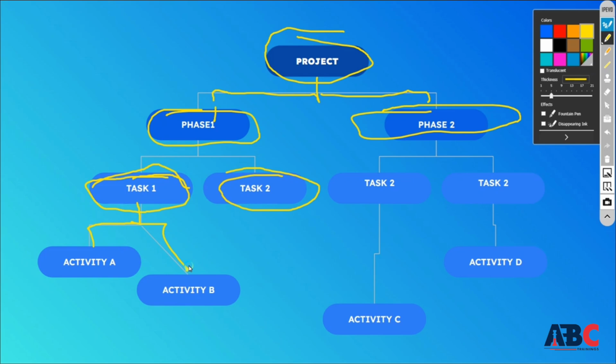After that comes the task. Task means a major task group. For example, after planning, designing is done. After designing, foundation is done. So that's how the work execution will continue. And if you want to set up an elevator or lift, that is one task. But in that there are many activities, meaning many subtasks. You have to do electrical work and fabrication work, then installation. So we have to divide all this into small pieces.